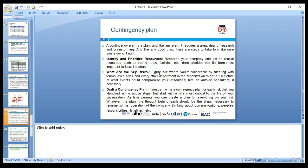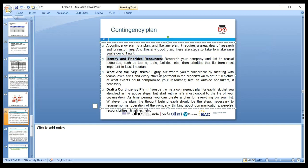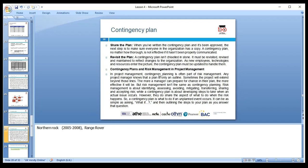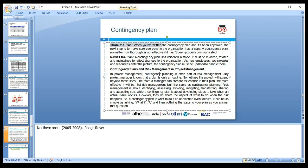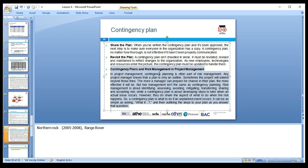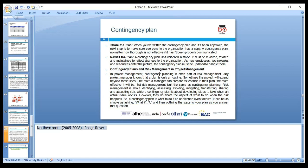A contingency plan is a plan like any plan — it requires detailed research and brainstorming. A good plan has steps: identify and prioritize resources, look at the key risks — high, low, medium — and draw the contingency plan for what we can do in case of risk and how we can tackle and address it. Share the plan with your team and revisit the plan. A contingency plan is a crucial document in risk management and project management. Like in the past, Northern Rock bank was dissolved, and Range Rover was taken over — we need to continuously review where we are, not wait until the last minute.